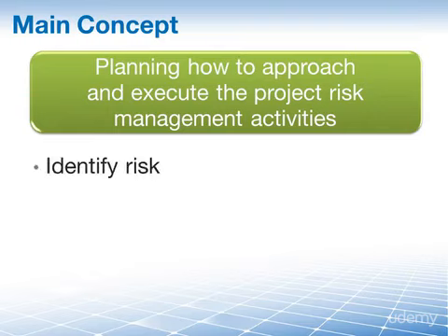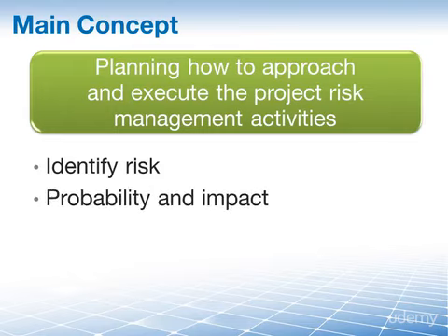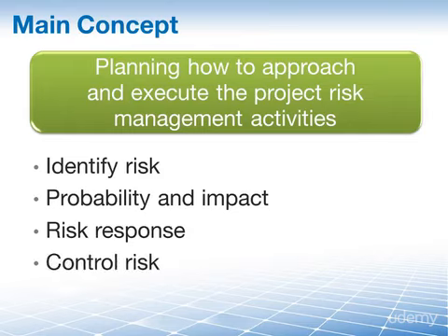For instance, how will we identify our risks? How will we define probability and impact of risks that we have identified? What techniques will we employ to define risk response strategies, and how will we control our risk during the life of the project? In other words, we want to create the risk management plan in this process.